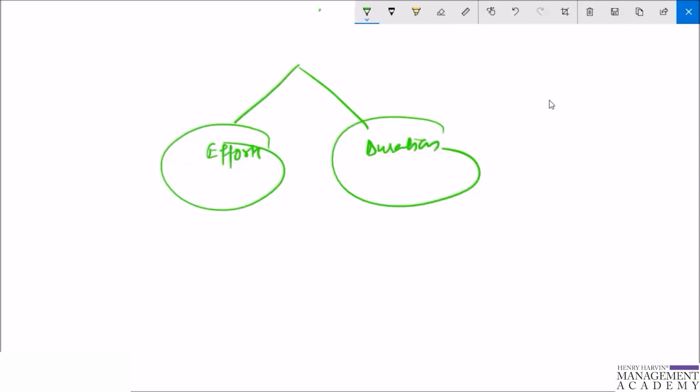So we might not get accuracy, but we should have a level of estimation that comes when we estimate the stories on the basis of the effort that is required, but not on the basis of the duration that is required, right? So you have to be very careful when you are doing this exercise of planning poker.